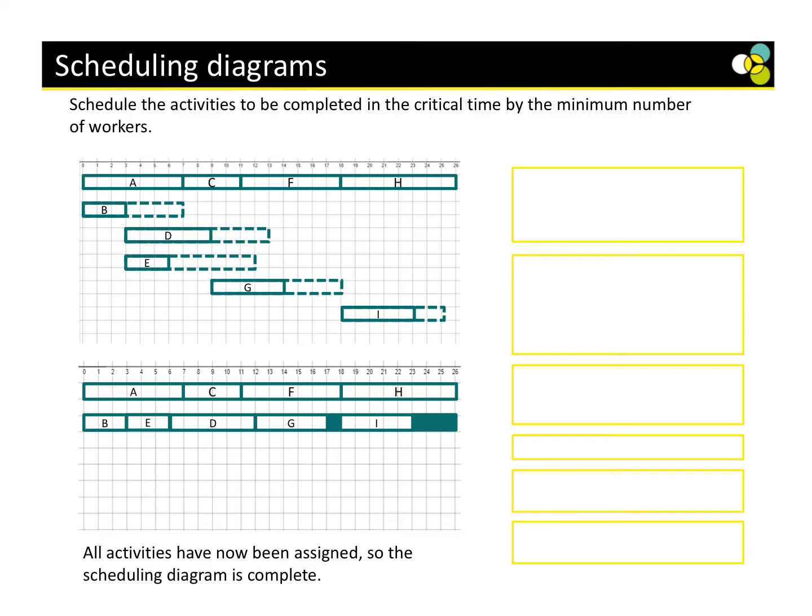You know that the critical path will always be the critical path. That will always happen. And then all they've done is use the sliders to see if it fits in. Can you see here that D and E, they've managed to put E before D? That's okay. We could have, though, put D here, and then would E have fitted in? Yes. The only time the order matters is if anything is dependent on anything.